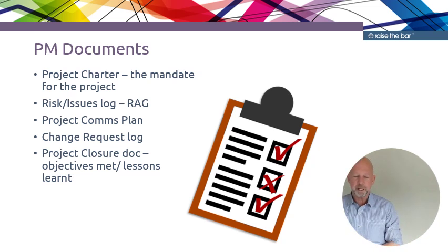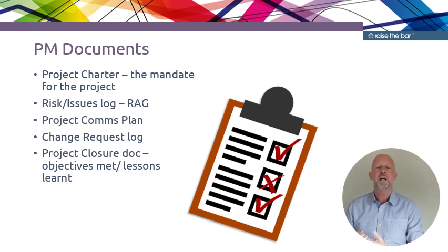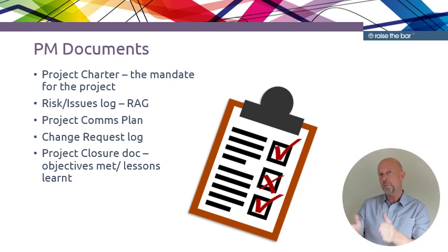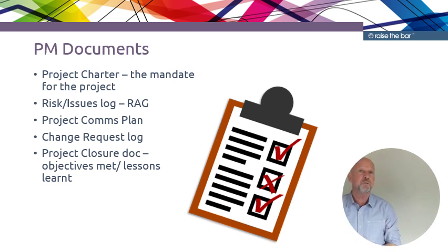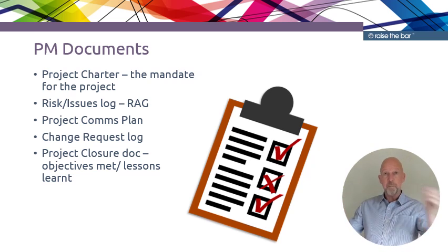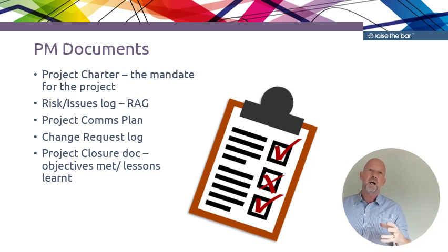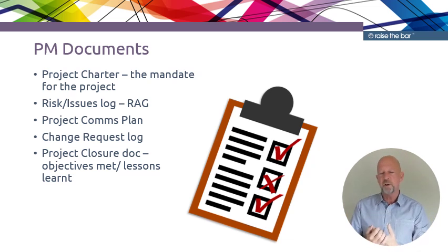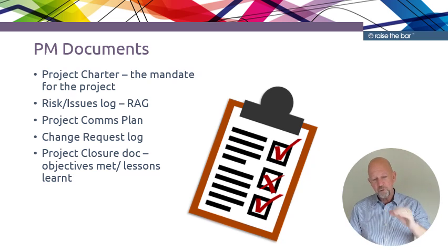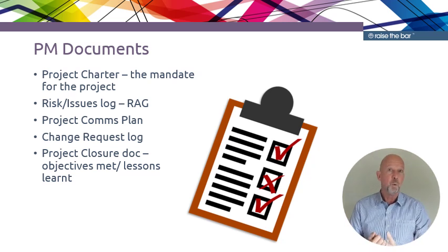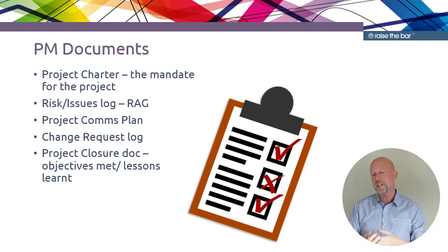And the last document I want to talk about is the sign-off or closure document. Typically when a project is completed and all the implementation is done, some kind of review is required. This is essential to make sure that, first of all, were the initial objectives met when we come to the sign-off, or to what extent have they been met? Also, what lessons were learnt through the project. Now, this is something that often gets overlooked, and I think it's a shame. If projects overrun or the money's run out, this can get overlooked, and then if lessons aren't learnt, if those aren't recorded and identified and built on for the future, we end up repeating the same errors, and that's problematic.